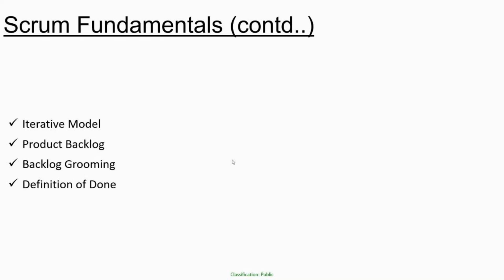So for that again there could be a checklist, like your user story should have proper user story mapping to a feature and an epic, and it should have got validated by the product owner, and then it should have the acceptance criteria in the defined format, and then it should have got the proper enumeration in the agile collaboration tool like Jira or Asana.